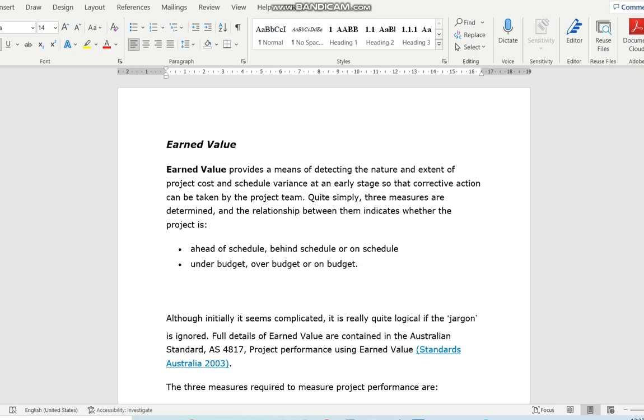So these two curves will set the foundation, and we call them PV, planned value. Okay, so I think that is quite easy to understand. We plan them, and then with the physical S-curve, if we look into earned value, which is the work performed, then we can get our schedule variances.